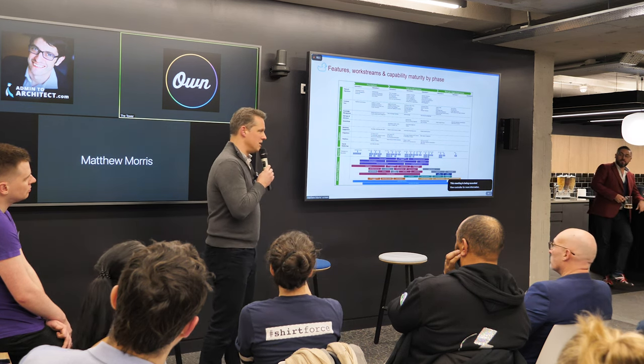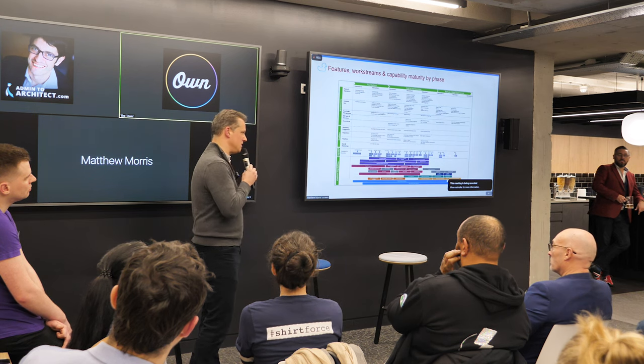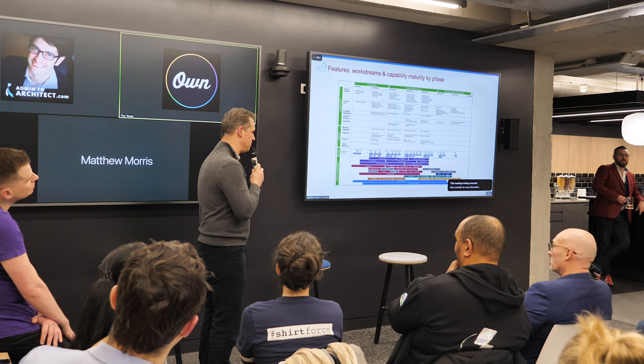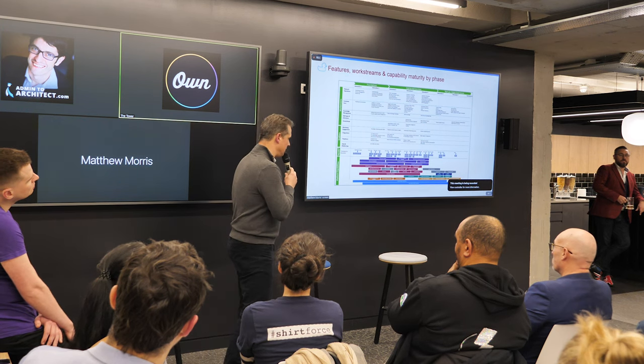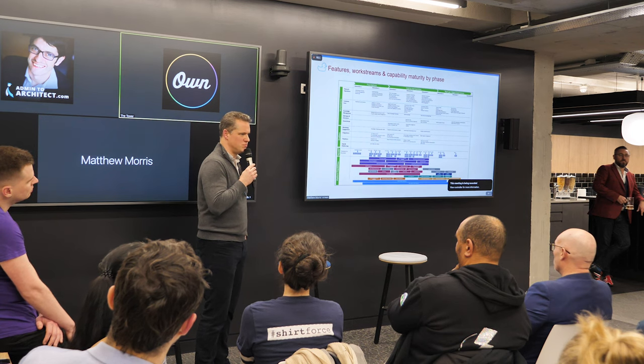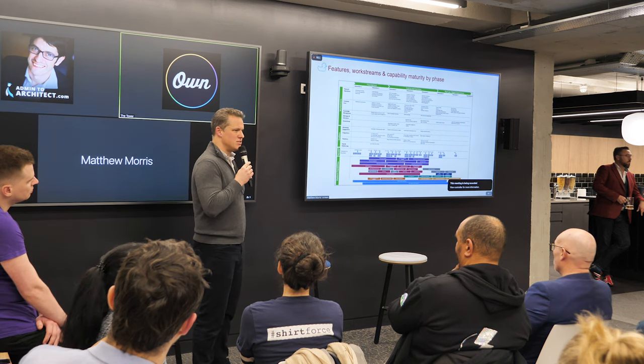So you'd have less budget, which means less people, which means either it's going to take longer or we're going to do less stuff. So it might be, okay, well, we'll scale back on the field service. The guys do it today in a particular way, so let's continue to do that.